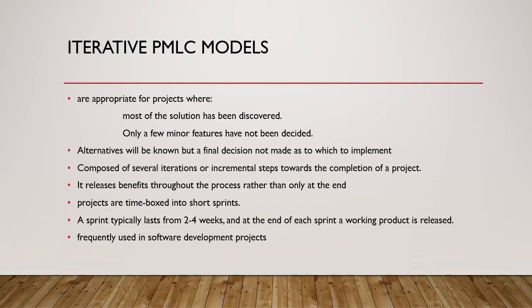It releases benefits throughout the process rather than only at the end. So in iterative models, we have project outputs at every iteration. Based on the benefit you get from the first iteration, you will give feedback, discuss with the customer, add some more features and come back for another iteration until you reach the point where you say, this is what I want.